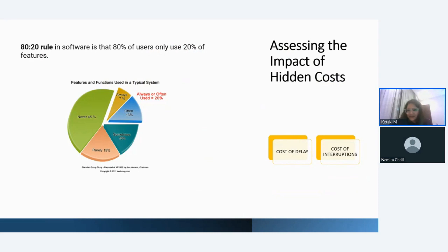But then when you really go deeper into the cost of delay and you apply a Kano model, maybe interview various personas, you apply the MoSCoW principle, and there are so many other frameworks in the market today that can help you determine the priority of the features that need to be there in order to eliminate the cost of delay and hence will mitigate the hidden costs that may arise in your projects.